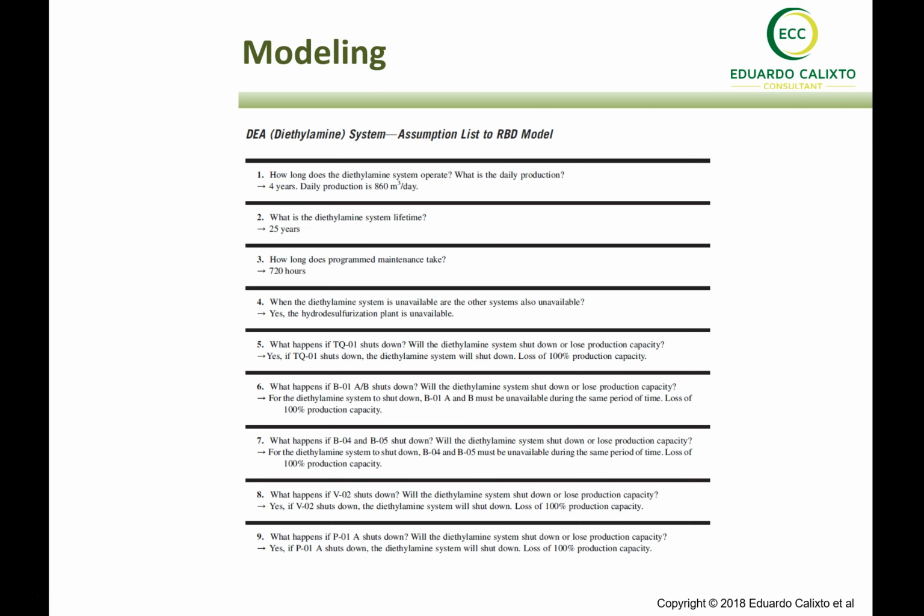It was clear that if they redesigned and changed the design, and this change needed to be represented again in the RBD model, that was not a mistake in the modeling, but just a change in the design configuration that was not informed to the reliability engineers.